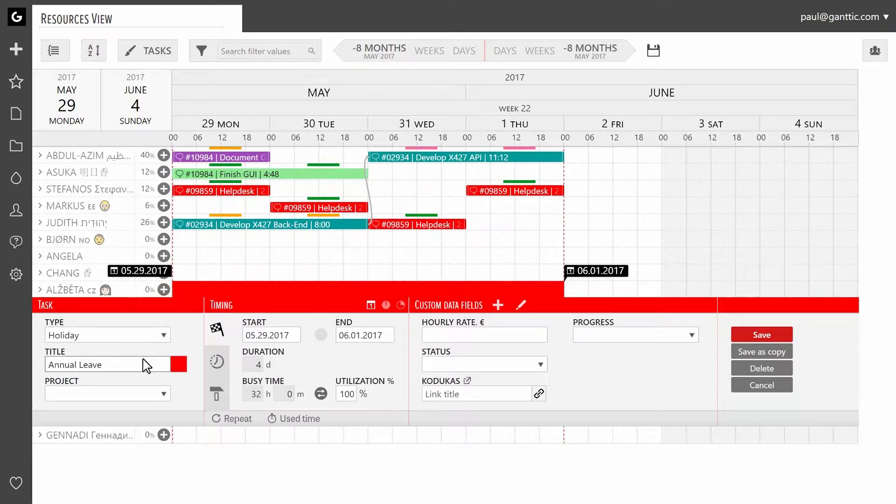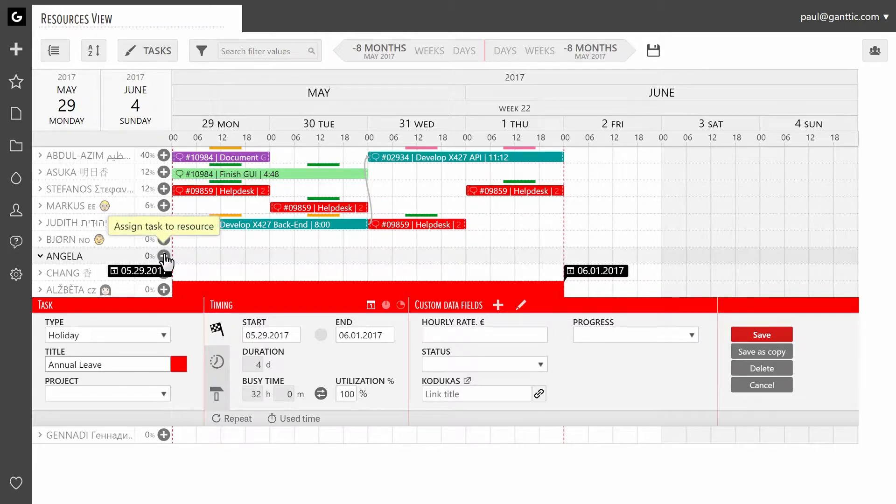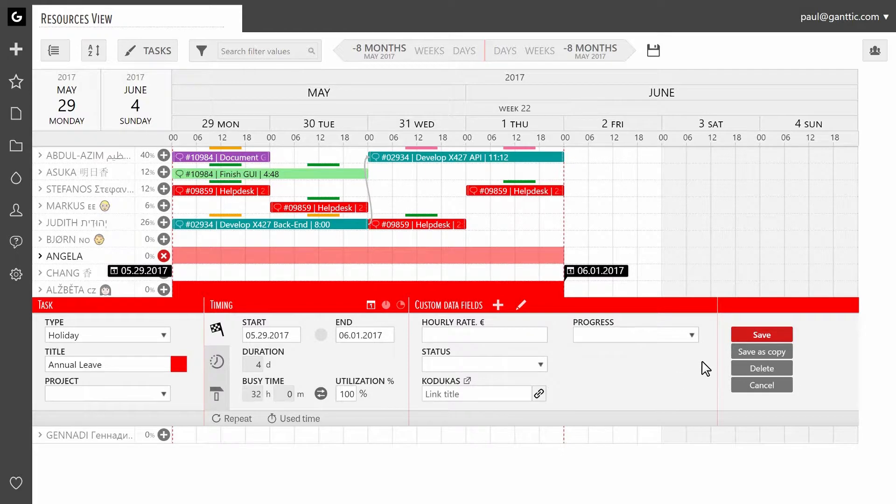Similarly to regular tasks, holidays can also be assigned to multiple resources. One way is to click on the plus symbol next to the resource you want to add the holiday. Click on save once you are done.